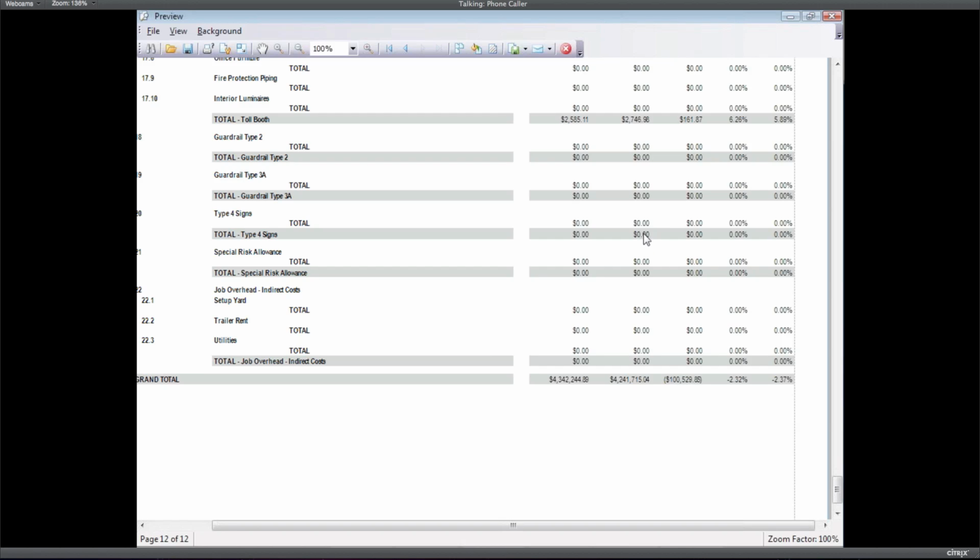This was kind of a trick question, but this project has some billing rates actually defined for some of the materials, and when we took quotes for some of those materials from outside suppliers, our quoted value came in higher than our billing rate for some of the items. As a contractor, you have to think about that. If we're going to buy something at a cost that's more than we can bill it for, you're going to know that by looking at this report. It's not a winning business model.